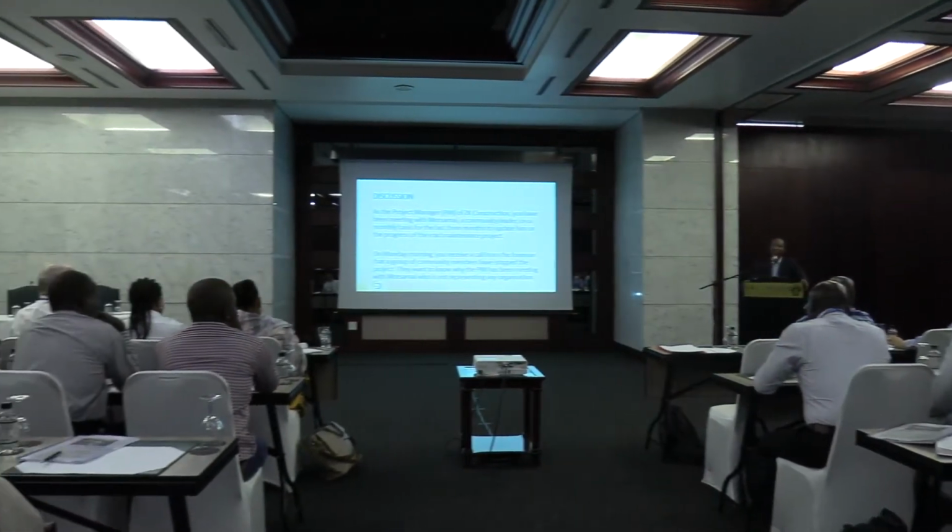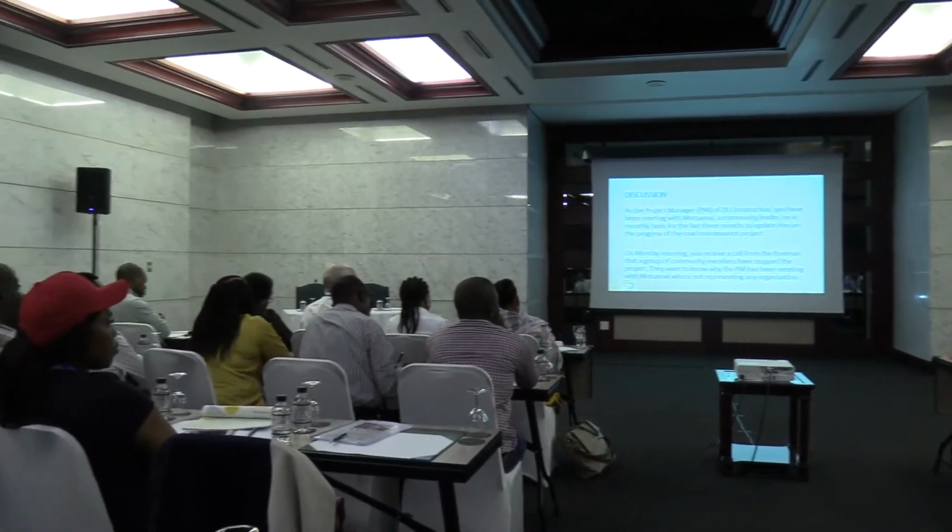It's important to have proper document management, so that tomorrow, when there's an accusation that your community liaison officer did not share certain information, there will be a record of the content of what was shared, and there will be a record of the meeting, and there will be an attendance register. I have seen public participation processes where perhaps environmental EIAs have to be done, and there were no attendance registers, and everything falls flat. So basics must be done. We must cover every base.